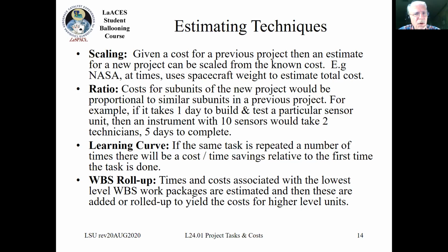It works for relatively limited spacecraft, which are dominated by, say, channels of electronics or something like that. But it doesn't really work very well for spacecraft or instruments which have a lot of dead or even active mass. Okay, so that's something to use with a grain of salt.